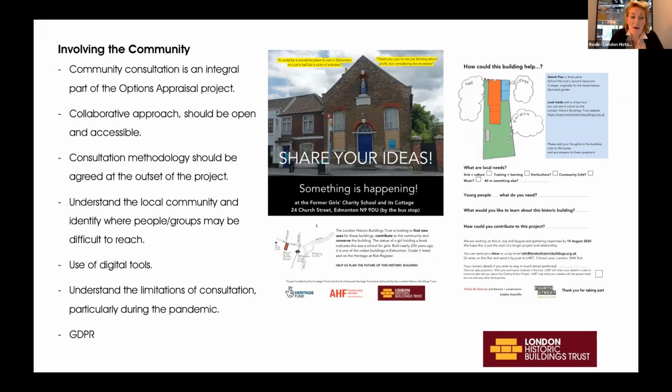Use of digital tools was really helpful for us because we did our project over the pandemic, so we created a virtual tour. And at any point when you're talking about consultation, it's really important to understand the limitations of that consultation, where you might have missed groups, where you haven't had the reach that you intended, so that you can pick that up in later stages of your project. And a final note is to consider GDPR in all of your consultation activities.